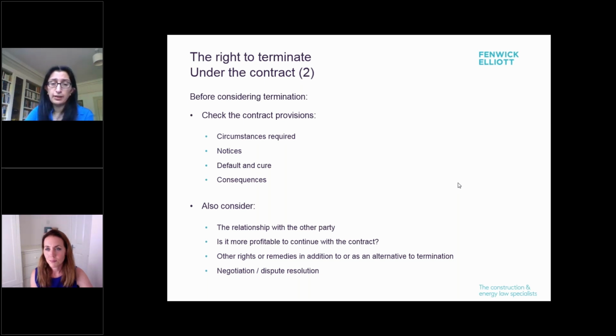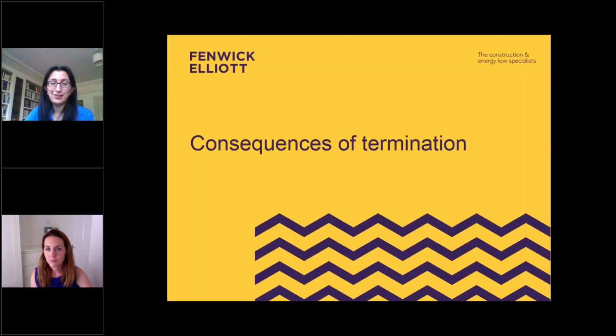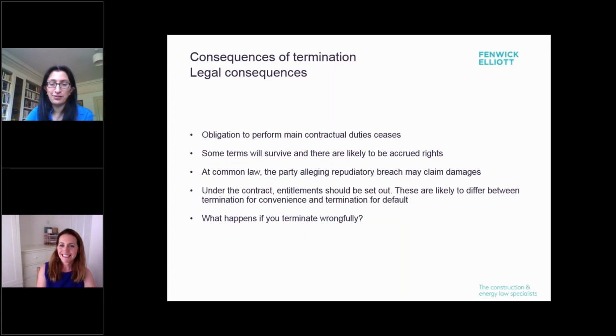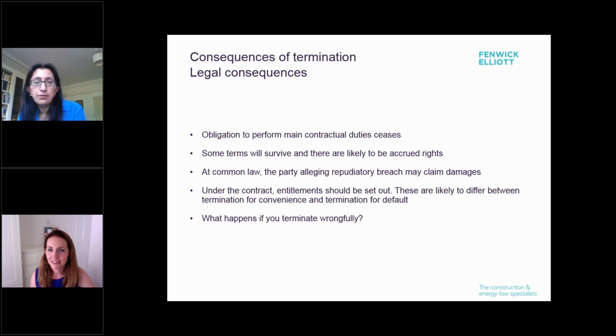So, moving on, onto the consequences of the termination. There are a number of legal consequences. Lucinda touched on the first one, which is the obligation to perform main contractual duties comes to an end. So you are no longer, as a contractor, obliged to undertake the work, and the employer is no longer obliged to pay you.